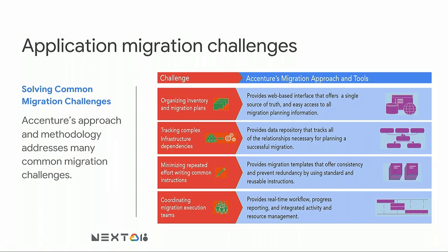You don't want every migration to be a snowflake that you have to figure things out every time. And the last challenge that we're trying to address in planning is really understanding your resourcing needs. Every organization that I know of is resource constrained, and you have to figure out how to work through that. One of the ways that you address that is with proper planning and laying out your different move types across your schedule so that you can predict what your resource requirements are going to be.